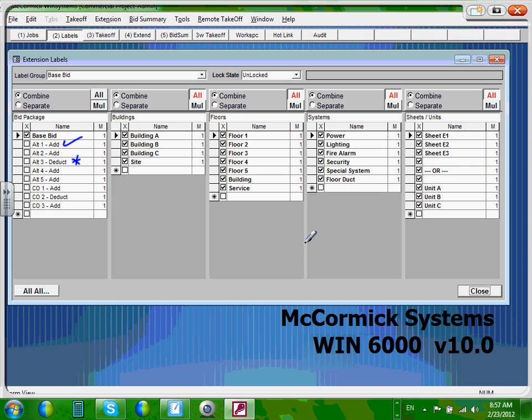In estimation, guys, it's not a linear process. There's a lot of things in estimation. When you estimate a hospital, how long will it take you? How much will it cost you to build electrically a hospital? There's a lot involved in it. So sometimes they might come up with a fixture like this, the cheapest, easiest, probably $80 fixture above your head. And then later on, they say, you know what, we're going to go to a more fancy fixture. Can you give us a bid for a more fancy fixture as well as for a regular fixture? Then you can add. That's where the additive is here. You can add to the bid.